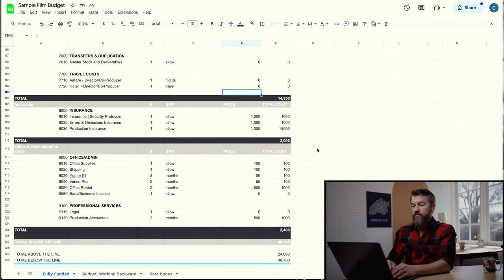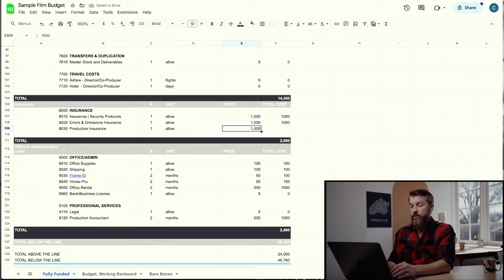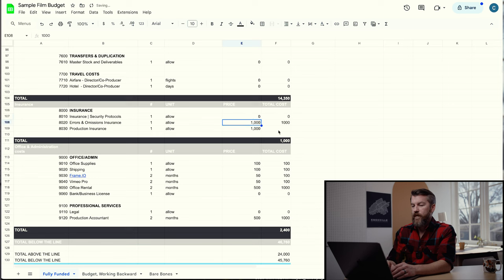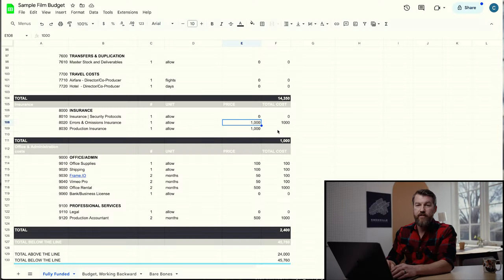Just a few more administrative things to add: insurance. Production insurance covers anything that happens on production — one of the more important things to have. Errors and omissions insurance covers anyone who sees your film and wants to sue you because of some error or omission you made in your project. It probably wouldn't happen, but it's nice to have.